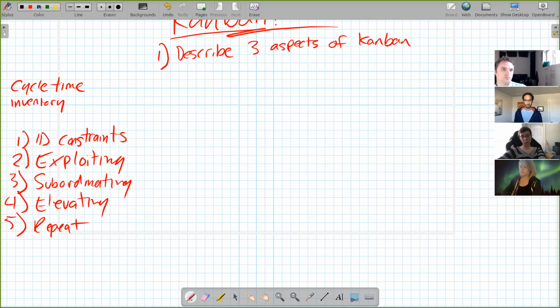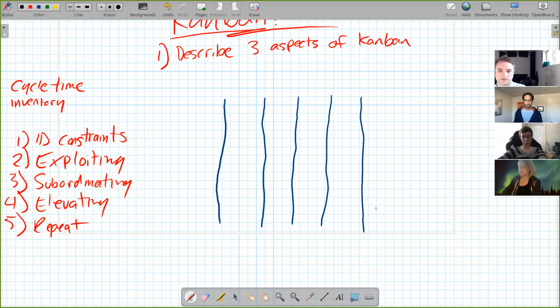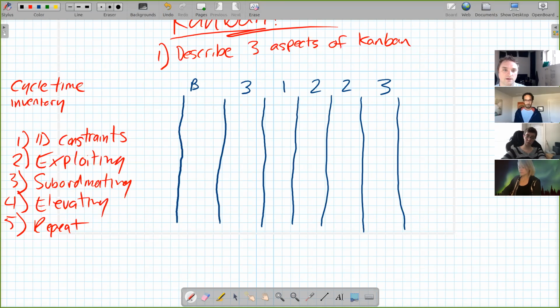If I put it simply, Kanban's a system where we're modeling any process as a series of steps and then putting limits, artificial limits that we're making up, on how many things are allowed in that step of the process at any given time. There's usually a backlog at either end of it, and a done.